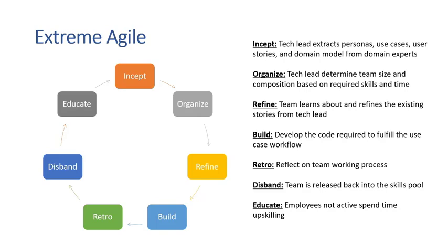We have this inception process. After some bit of work has been incepted, we then organize the team and scope the size of the team according to the work that needs to be done and the time constraints on doing it. Then we go to the refinement phase, where once we've assembled the team, we present to them what the requirements are and let them refine and look over those requirements to come up with maybe the overall reflective strategy. And then they go about building the actual product.